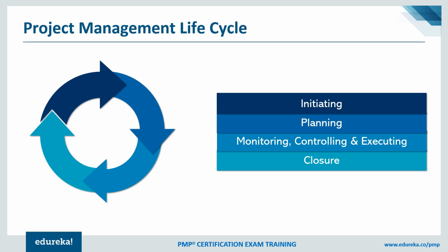So these are a few factors which would be influencing the different phases. And more than anything else, we also use a word called phase gate. That means whenever one particular phase comes to an end, we call that a phase gate. Gate means there is a review supposed to happen. So there is a person standing there who would like to know why you are moving. Have you done the deliverables yet? Have you not completed the deliverables? So the word gate basically relates to the end of a phase and the second phase starting up.